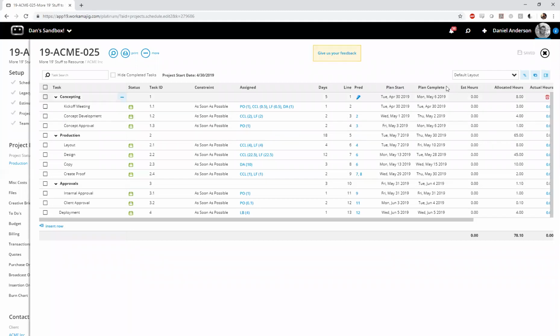Number one, to keep you from having to manually change all of this stuff anytime anything goes a little bit sideways or goes a little bit wrong on your projects. But two, also to give you the most accurate resourcing detail to the moment. So, this task is slated to start on the 13th. We'll schedule it, we'll resource it that way. But if it doesn't actually start until the 15th or 16th, we'll adjust or pivot and still show that there are these hours for these users or these resources needed.